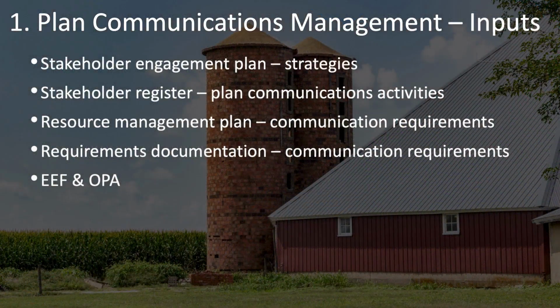The Plan Communications Management process has as its inputs the Stakeholder Engagement Plan, the Stakeholder Register, the Resource Management Plan, your requirements documentation, as well as some enterprise environmental factors and organizational process assets. Stakeholder engagement and communications are very closely related. And so it's no surprise that the strategies that you've identified for engaging your stakeholders will include a lot of communications requirements that you need to include in your communications management plan.